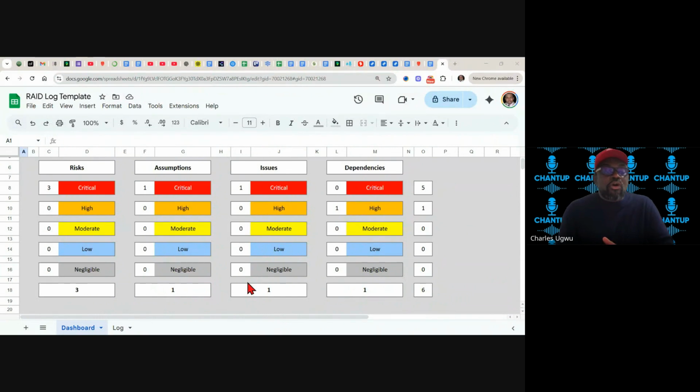Every team member will say, this is what I did yesterday, this is what I'm doing today, this is where I'm struggling. As you are saying that, the Scrum Master will be recording what everybody is saying. From that, the Scrum Master will understand where every team member is struggling, and the team member will take it upon him or herself to resolve the issue. That is another risk management in agile projects.